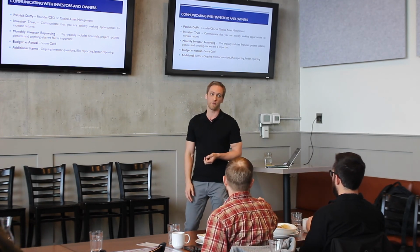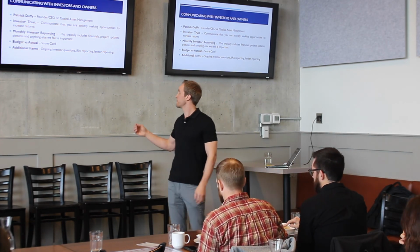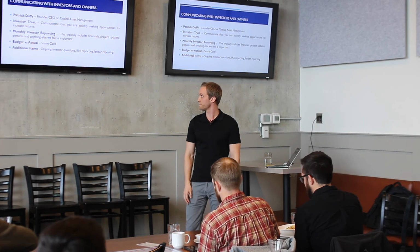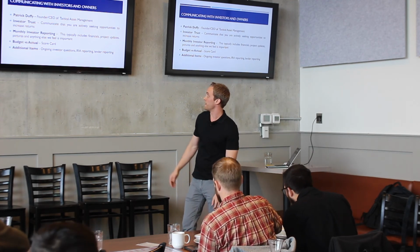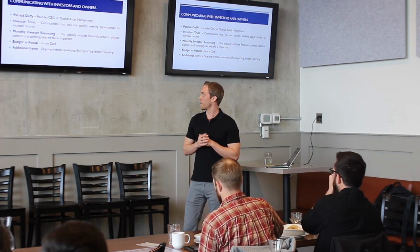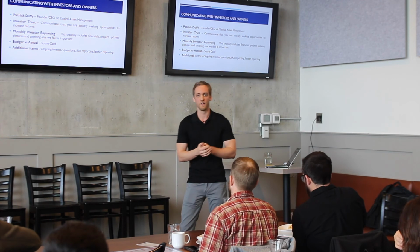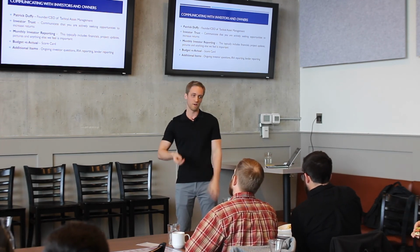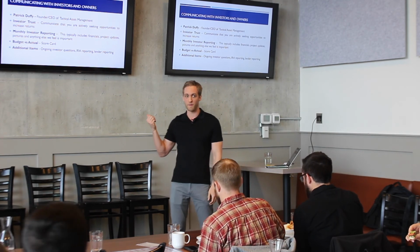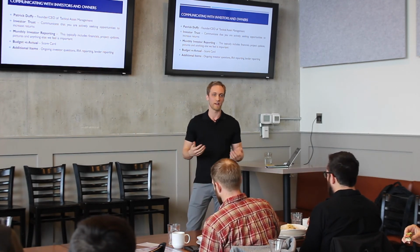And one way we do that is through monthly investor reporting. These reports will typically include your financials, project updates, maybe some pictures, and just any narrative, anything we think was important to add in there. And included in your financials is a budget versus actual on a monthly basis. We could do a whole speech on that alone, but in general it's kind of like a scorecard. It'll outline any areas where you're doing well, as well as any areas where you can improve. For example, if we're high on our marketing costs, we may want to pinpoint our top 3 sources, tighten up on that, and then again, like I mentioned in the beginning, maybe renegotiate that contract.